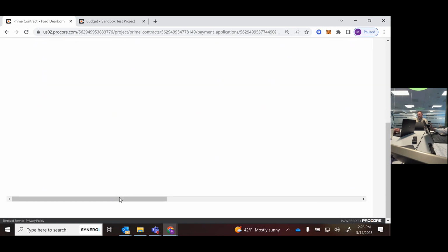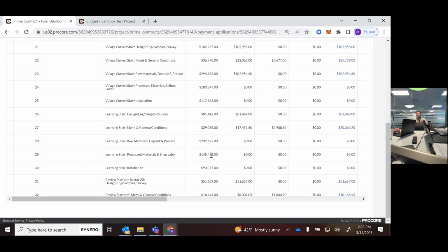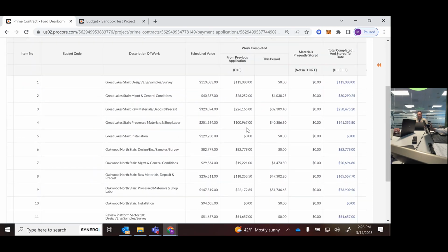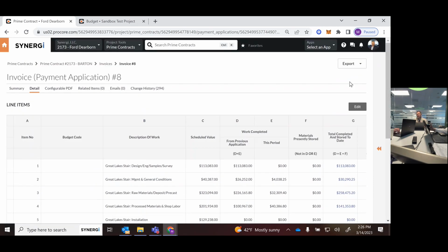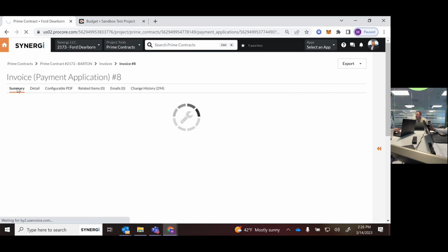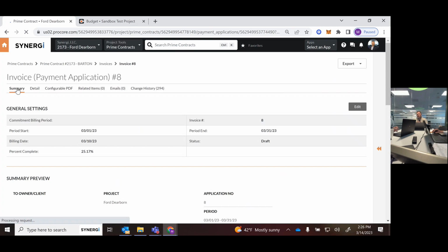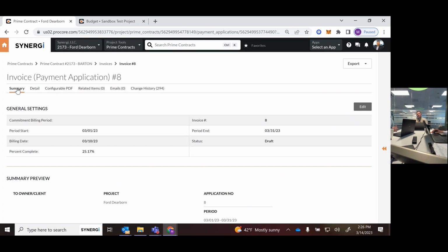And then we basically take this and do our pencil rec, if you will. Create it as the project management team. And then we just email this over to Giselle. And then she takes it and submits it to the GC for us, because most times they have a different payment application portal. Trexpera has been used by a lot of folks. And so she'll take this, convert it into a CSV file so she can copy and paste it into Trexpera and send it out to the GC.